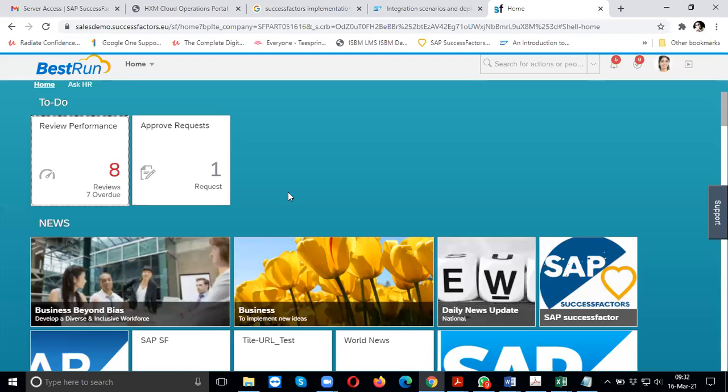Usually, Anush, for the provisioning setup, whatever is done, like home page designing and data load and everything, how long does it take for a medium-sized company? Within a week it happens. Generally 24 to 48 hours is the turnaround time for SAP to reply to them. So within a week all these things happen: importing the data models and starting the instance system. Within a week it is configured.